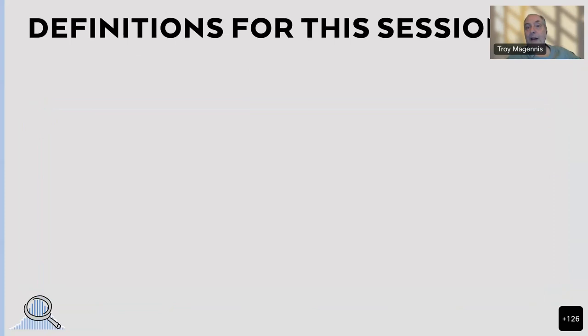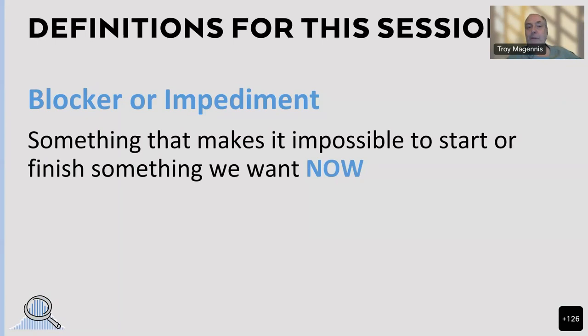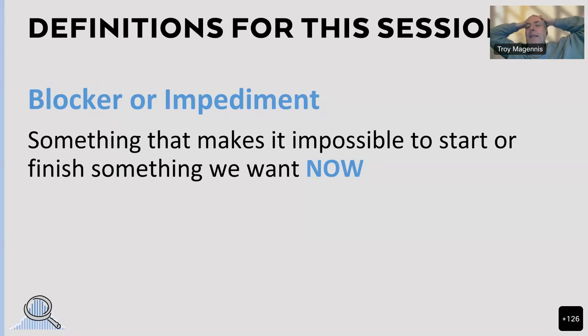All of these are valid types of dependencies in the agile world. Just re-organizing or cross-training teams only really solves one of these. If we view dependency management as just an organizational problem, we'll miss many reasons why work needlessly sits idle. We need to broaden our definition. A blocker or impediment is something that makes it impossible to start or finish something we want now. If we have Kanban boards or scrum boards, often the question at stand-up is 'are you blocked?' And we used to put red sticky notes on yellow sticky notes to flag blocked work.